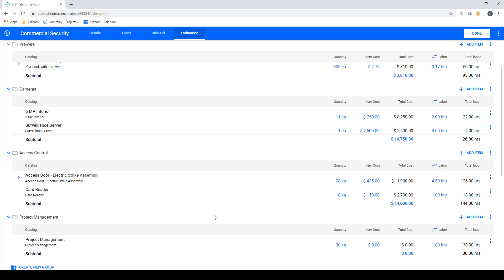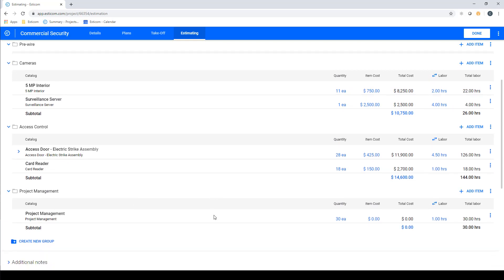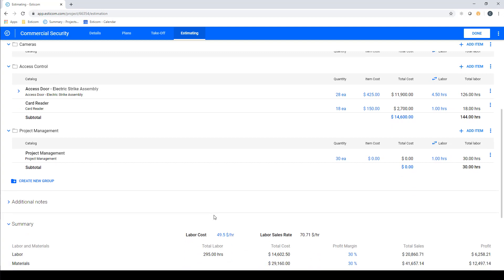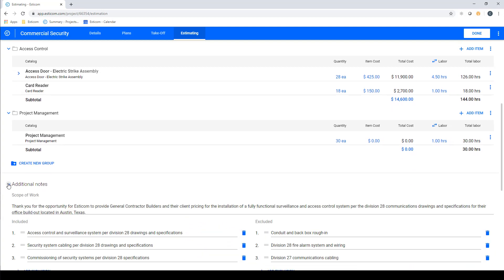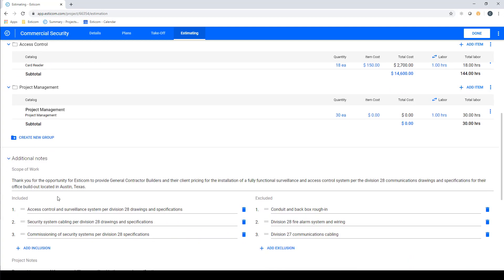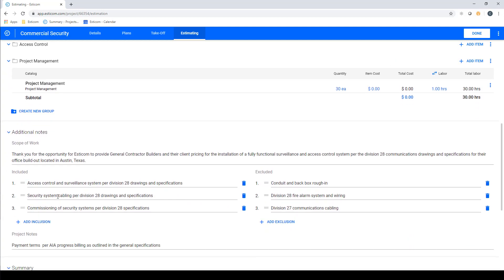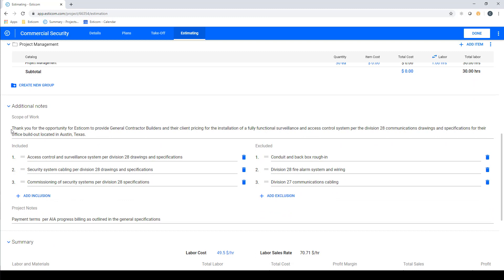Now that we have our estimates set up, let's move down to the additional notes section and review our scope of work description, inclusions and exclusions, and project specific notes on payment terms. You can save this information from project to project and update on an as needed basis. The details here will appear on your customer-facing quote.